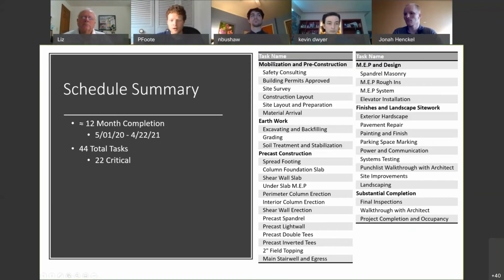So for our project completion, it is projected to be just about 12 months, starting in May of 2020 and ending the following year in April. The schedule was oriented to try and occupy space during the lowest period of student enrollment. So by starting in late spring, we could actually reduce our total interference with the fall and spring semesters, so we could achieve our ideal construction time during the summers.